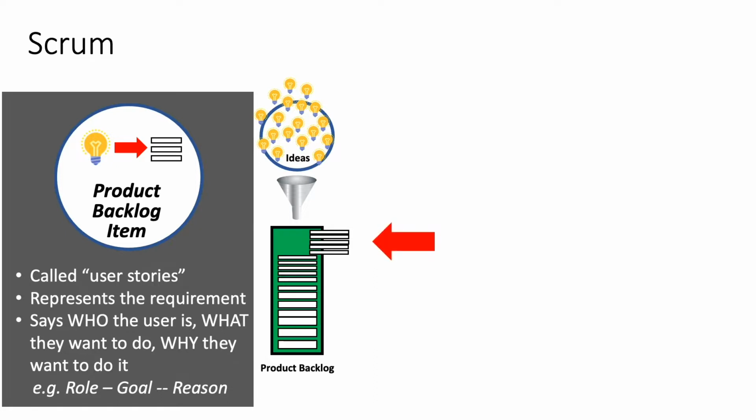User stories help the product owner communicate three areas. One, who is the customer or the user? Two, what does the customer or user need to do from a business function perspective? Three, why the business function exists. Now, this gives the team an idea on who the user is. Together, these three parts of a user story give the team a high-level understanding to have a deeper conversation on the work item with the product owner.